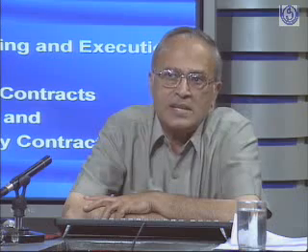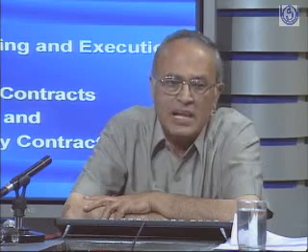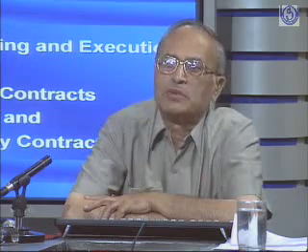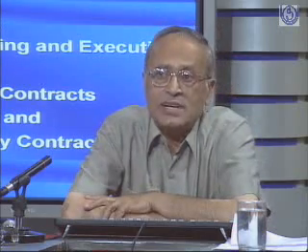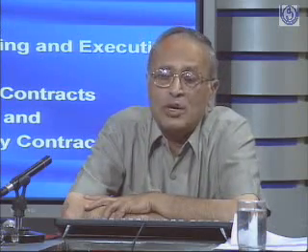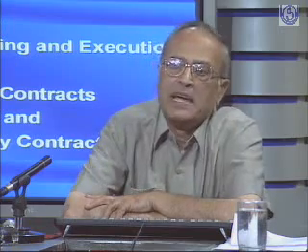In sensitivity analysis, I change one variable at a time and see how my project behaves in terms of break-even and IRR. In scenario analysis, what we talk about in practice is not only one variable changing at a time; it may be many variables.